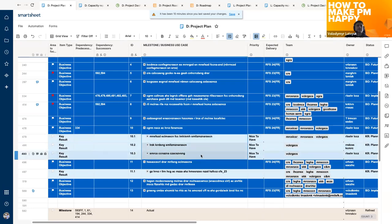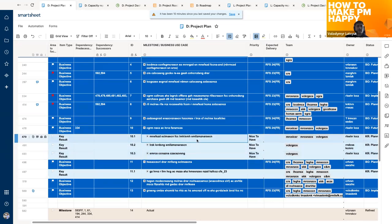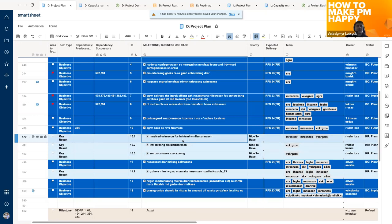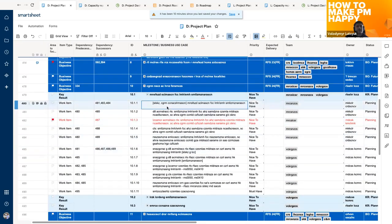After this workshop we've crafted a business objective and several key results that let us say the business objective is achieved if each of these key results is achieved — and since they're measurable, it's clearly understandable when we've achieved them or not. At this point, product people and technical specialists come into play. There are usually a couple of sessions where tech leads and key stakeholders gather together, talk about particular key results, and determine what could be done to make sure each key result is achievable. When they identify something, they put it as a child item under that key result.